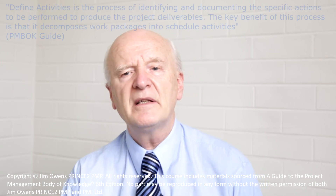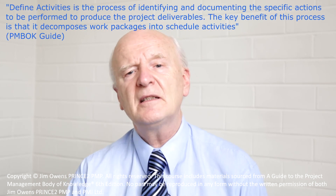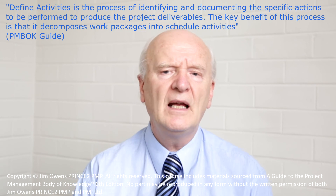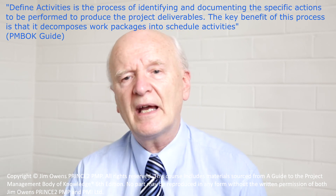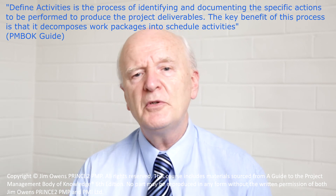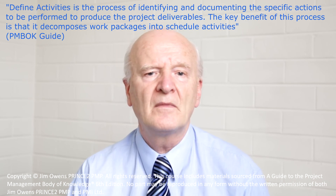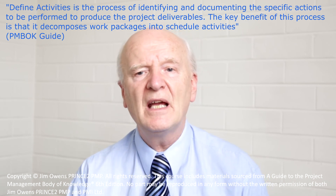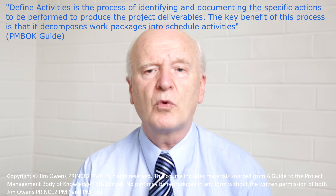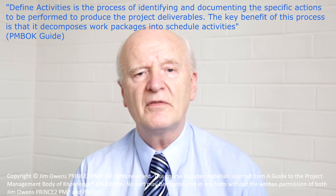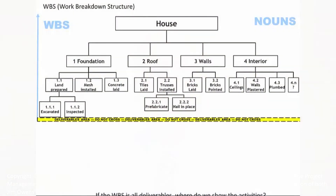The PMBOK Guide tells us that Define Activities is the process of identifying and documenting the specific actions to be performed to produce the project deliverables. The key benefit of this process is that it decomposes work packages into scheduled activities. Our next step is to create another chart below the Work Breakdown Structure — this chart is called the activity list.